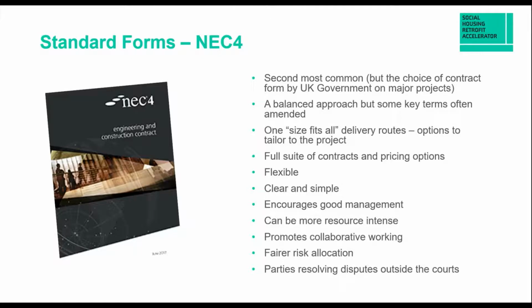So again, like JCT, they have that framework, they have management forms, but NEC does also have alliancing forms of contracts for services, and with their NEC 4 suite, they released a design, build and operate contract, which might be good to consider if you're looking for maintenance requirements in that contract. You'll see from the next slide as well that NEC has a range of pricing options, more than JCT. You'll see from the picture there, the latest version is the NEC 4 suite, which was published in 2017.